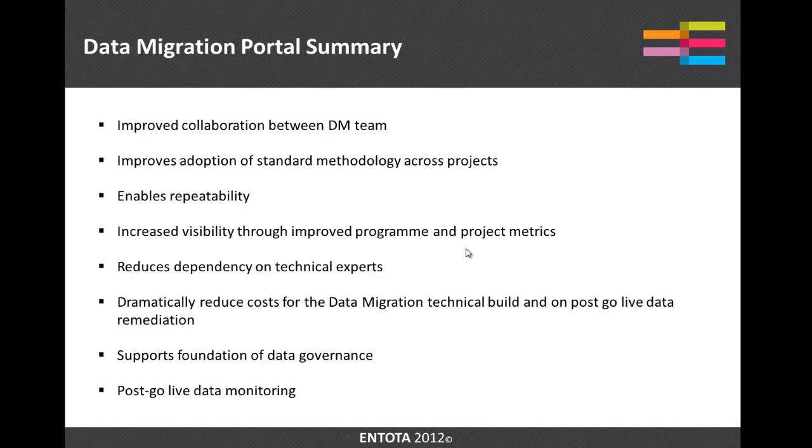Supporting the foundation for data governance, we're introducing the concept of data governance. I've heard it mentioned it's kind of a backdoor entrance to bringing data governance in, but what we are introducing is the concept of sign-off of data definitions. Because the data definitions and the mapping specifications are going to drive the code generation, there is no 80% complete. There is no 'I think I'm nearly there.' We drive that process of someone signing that off because that is what the code is going to generate.